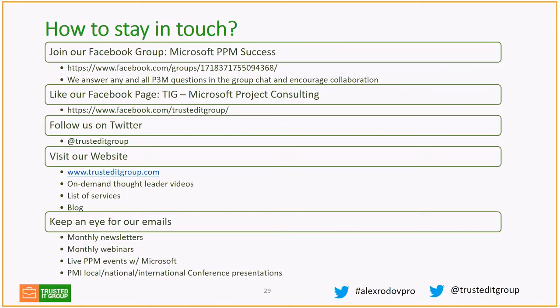I hope that kind of clears the question, but I'm hearing myself, and probably the answer is not satisfactory. So the way you would understand whether this is project to project or project to epic, you basically put the agile team in front of you and say, okay, do we treat this as a project or as an epic? If you decide to treat it as a project, then you create a second project, which would be one-to-one related.